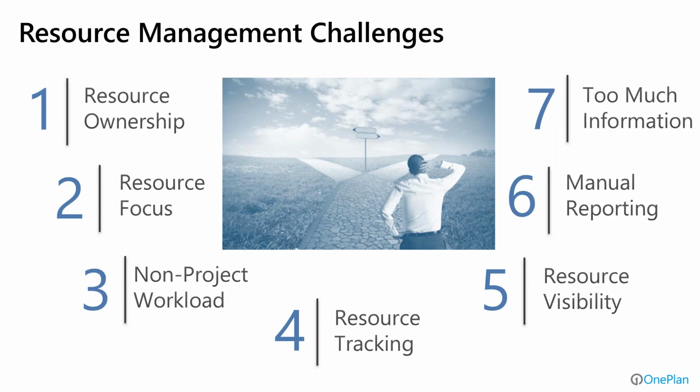Non-project workload. In organizations that have operational work streams and resources that participate in both operational and project work, non-project workload, especially operational things, can often take precedence and divert resources from project-specific work and impact our ability to complete those projects. Also, resource tracking. We may plan and have assumptions on our resources, but where are resources actually spending their time? And are we spending resources to the degree that we thought we were? Or is it taking more or less time than we thought? That tracking piece is something people often have a challenge with, beyond just the planning or the allocating of the resources.